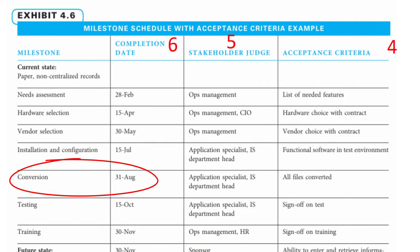Alternatively, if the conversion needs to occur after installation and configuration, this allows approximately 6 weeks for conversion. This timeframe may or may not be reasonable based on the number of files to be converted and the number of employees assigned. The project manager and team would need to be clear about the time it will actually take to complete the conversion, as this is likely to be an enormous activity in a large organisation.